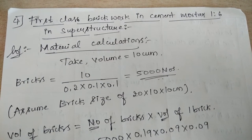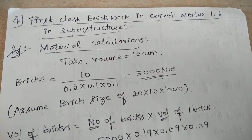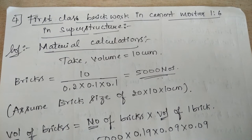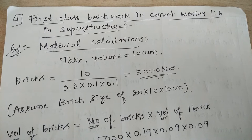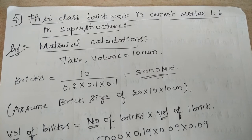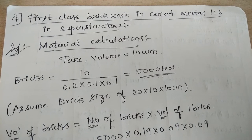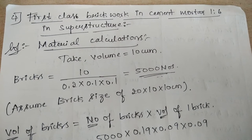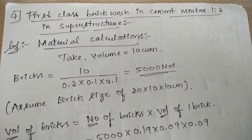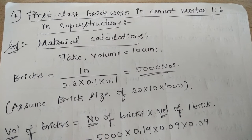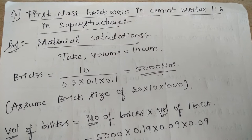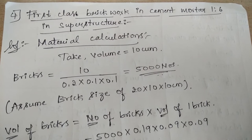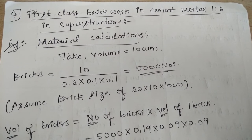Let us do the rate analysis for the next item of work, that is first class brick work in cement mortar 1 is to 6 for superstructure. Starting with the material calculation, let us assume a volume of 10 cubic meter.